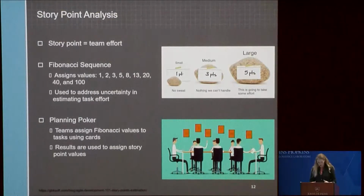It must be noted that, again, having multiple labor rates for any of the estimation techniques requires that the man-hours are broken out by labor type and multiplied by the specified labor rate. This will provide a higher fidelity estimate. For example, a senior developer may take fewer hours to complete a task, but will cost more than a junior developer. So that also adds some variance into our story point analysis.